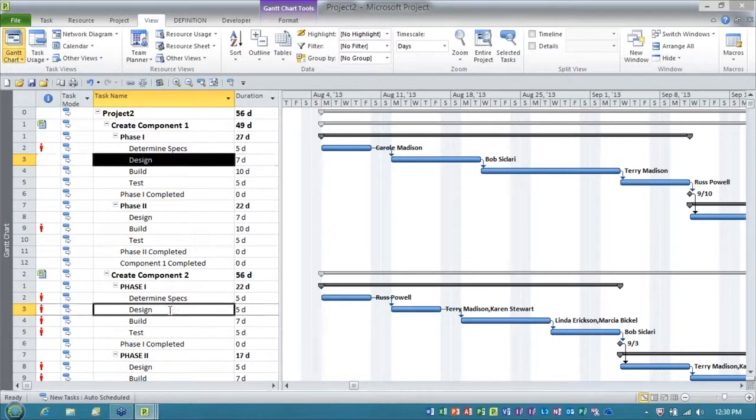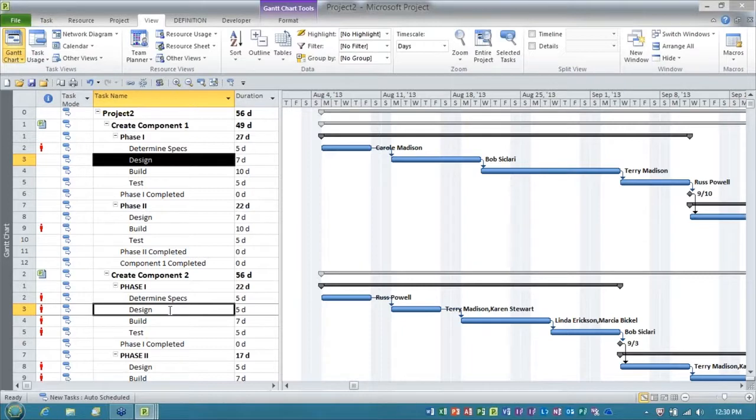Now the way the work is going to happen across the projects is we'll do the design task from phase one in the first project, and then we'll start the design task in the second component project. So I'm going to go ahead and link those.